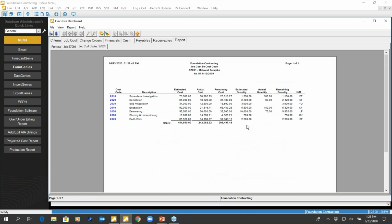where a lot of people aspire to have a nice cost code structure. And what we're able to do is set you up with your own structure, where now we can begin to analyze not only if the job's making money or losing money, but what areas do we have cost in? Hey, what do we have out there for earthwork? And that's all going to be real time, with the accounting system completely talking to all the job costing.